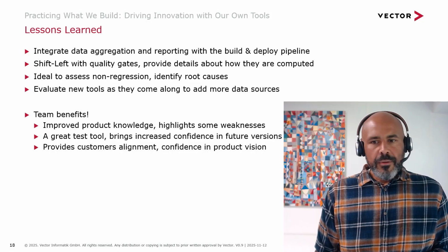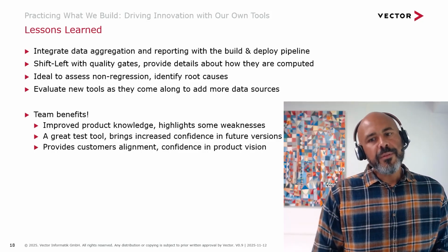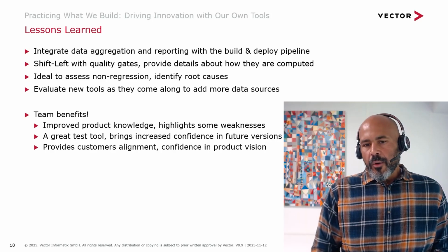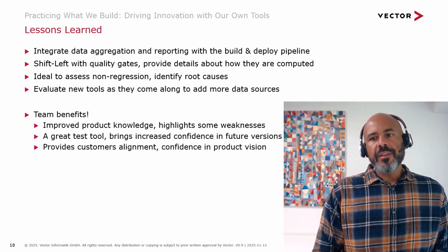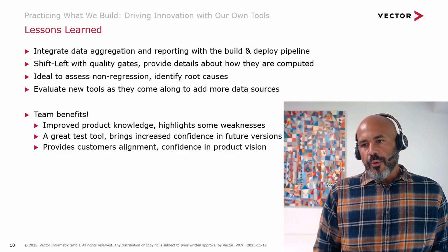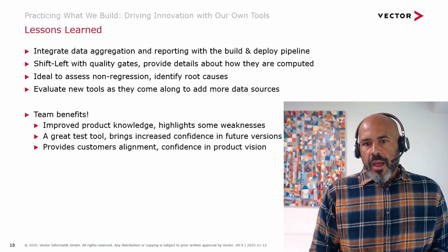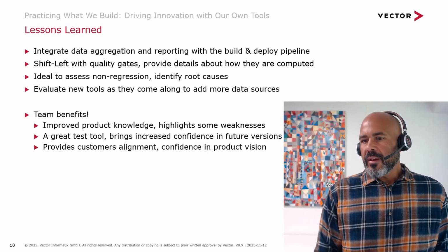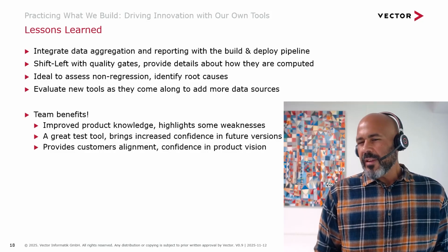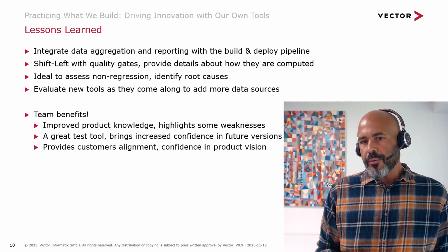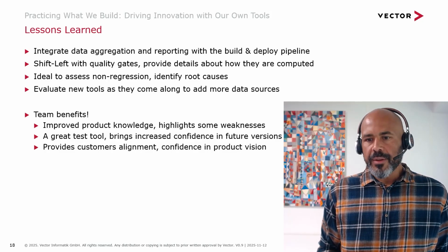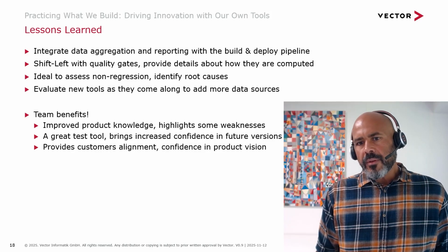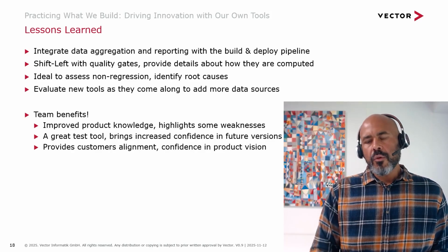And then the final thing we learned is that you should keep evaluating new tools because the more data, the better. Also, keep building a history of data, even if you don't necessarily know how it will be useful in the future. In our example, it took us a few releases to determine what a realistic objective would be for the number of open issues 3, 2, or 1 sprint before the end of a release. But the only way we could determine those numbers was to look at past data in Squore after collecting it for a few months.